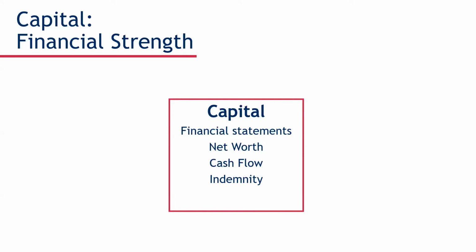So all different components of the financial statements, all different components of the cash flow and net worth are reviewed as part of the underwriting process. And last but not least is the indemnity. That's essentially the guarantee. In the wonderful world of surety, there is both a corporate guarantee, which is your corporate entity signing the indemnity agreement with the surety company that basically says, Mr.